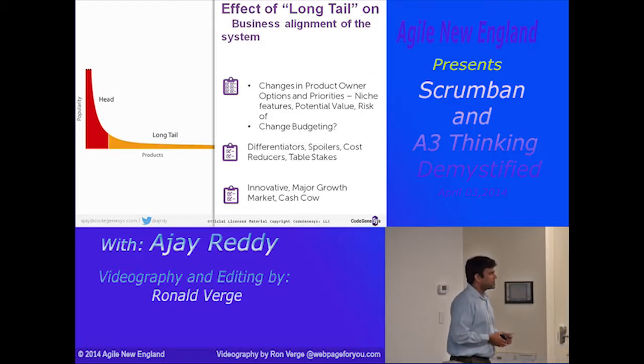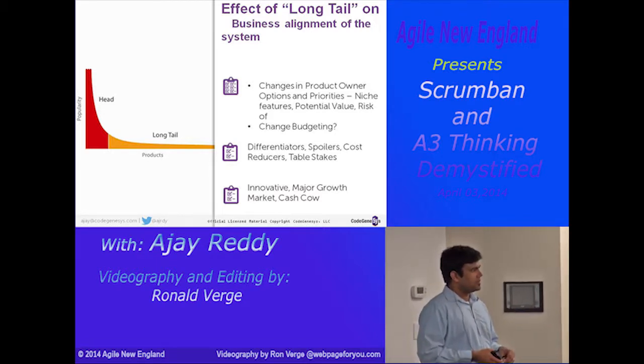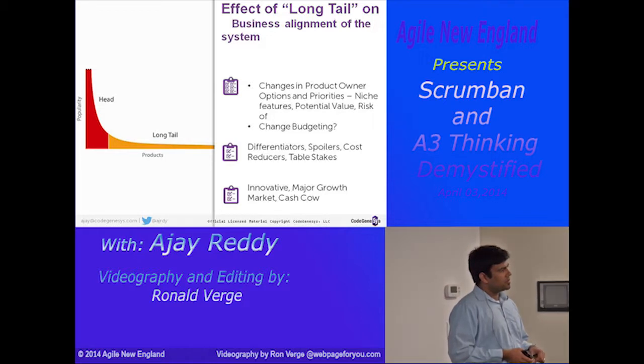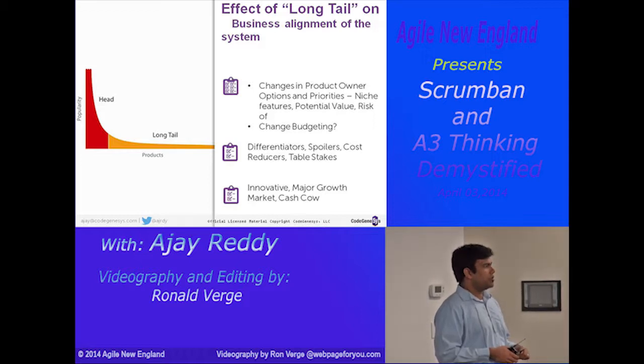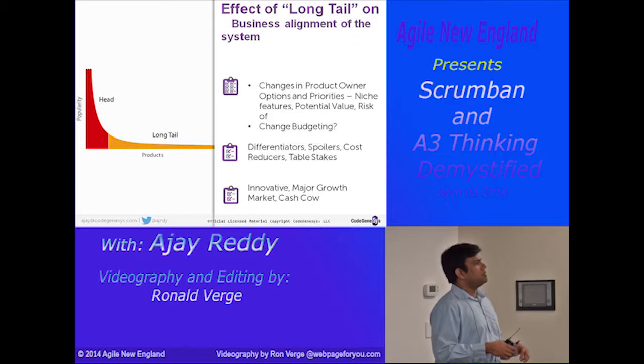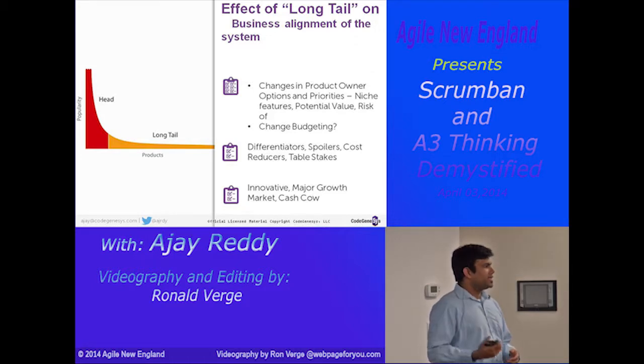And with Scrum, you seem to have very ceremonial planning sessions, right? Is there any differentiation under Scrumban? Is it more dedicated to the product? Does the product owner spend most of the time prioritizing, or is it still group planning? Yeah, it depends on the maturity of the team. I'm not a huge fan of the product owner as the sole authority on priority. I don't like that model in general, but in this particular case, the Scrumban teams had a shared understanding of what the risk was, what the market was. So when something was higher priority, it was determined as higher priority by everyone. It was just obvious because it was visible and transparent to them what the market issues were, what the business issues were.